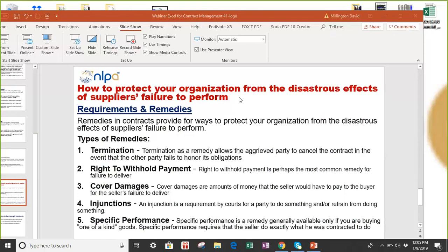So a rule of thumb is to scorecard each one of those parameters. Again, the occurrence, the number of occurrences you've had, on a scale of 1 to 10, the likelihood. So if you score 9, that's very, very bad. If you have 0 occurrences, then the score on that particular supplier would be 0.